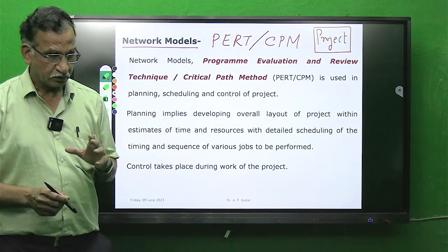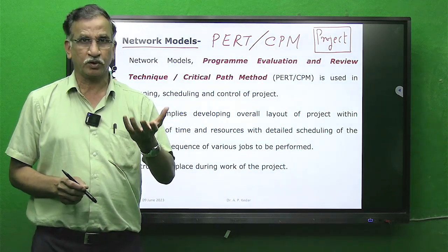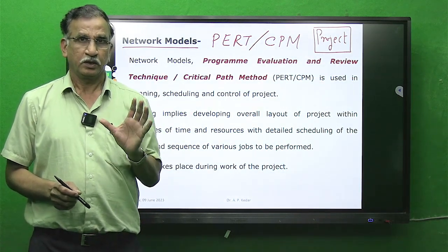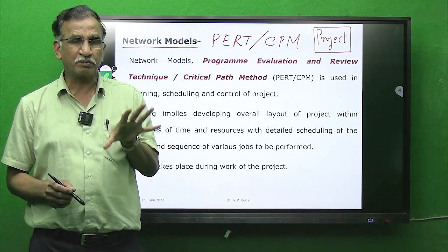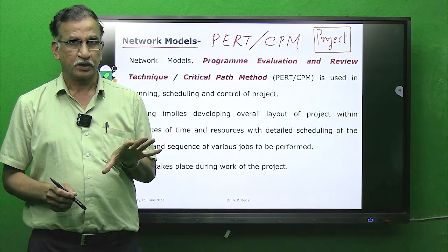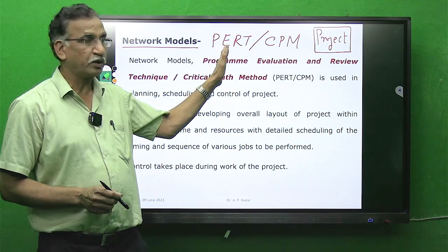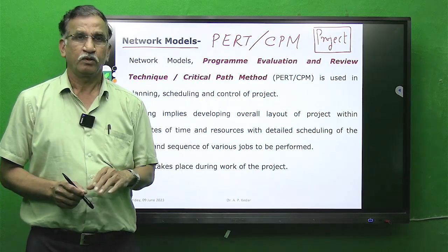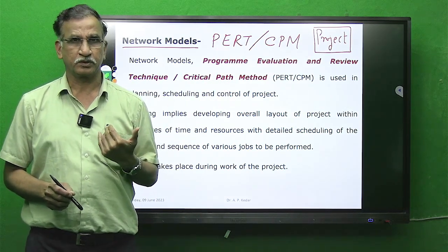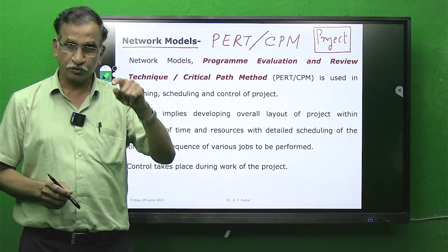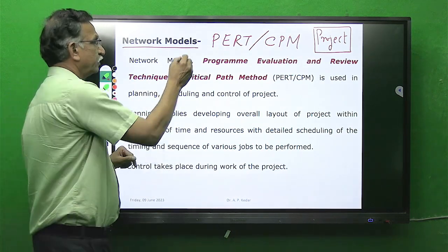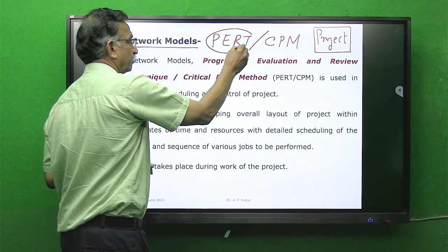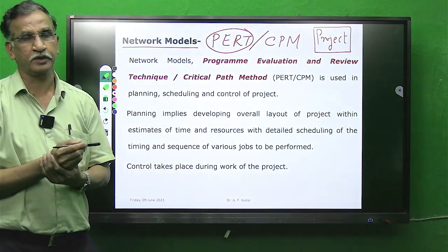So when things are not within your control, when you are not sure of the probable time of completion of the project, when it is probability based but you know the sequence of activities to be performed, we prefer PERT, Program Evaluation Review Technique.